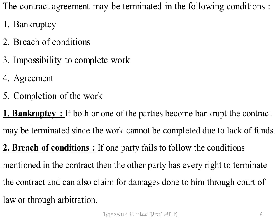Breach of Condition: If one party fails to follow the conditions mentioned in the contract, then the other party has every right to terminate the contract and also claim for damages through a court of law or through arbitration. Breach means one party — whether the contractor or the owner — fails to follow any one rule of the contract. If that happens, then the final process will be termination.